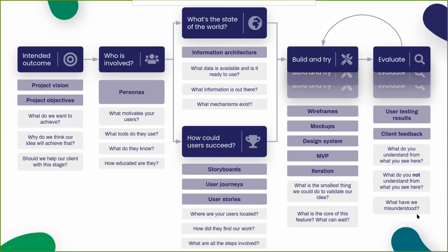So, of course, like we've just discussed, the degree to which you do this depends on the scale of a project. For a 2-week project, it might be some notes and or sketches. You can treat each artifact like a heading in one document. For a 2-year project, each deliverable might make more sense as one or more documents, and perhaps some posters or things you can put on the wall. You might want to document your methodology for coming up with your vision or your user stories or something like that, so that 6 months later, you actually have an idea of where this came from.